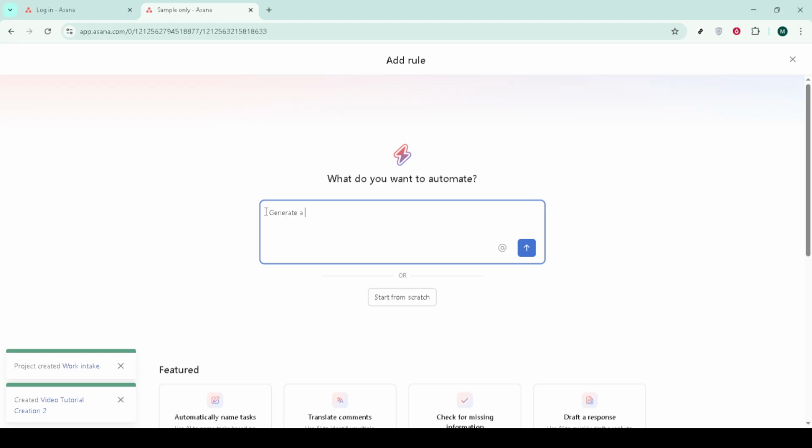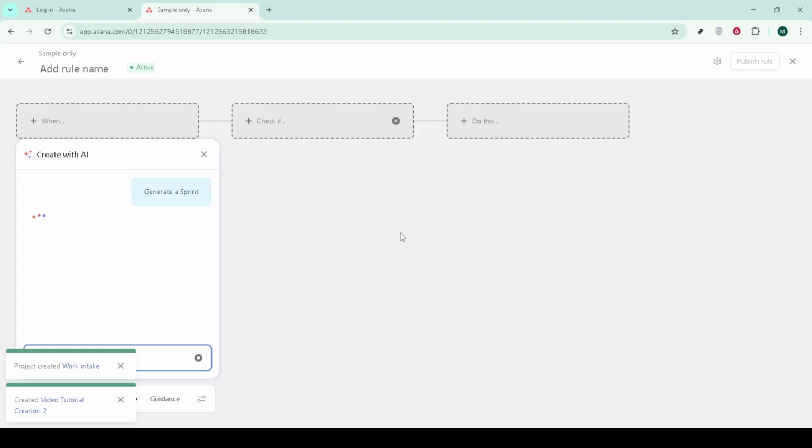At the end of the sprint, use the completed sprint board to walk stakeholders through what shipped. Open relevant tasks, link deliverables, and show the done column to make outcomes tangible. In your retrospective, analyze what went well and what didn't, using completed tasks for concrete examples. Compare estimates to effort, note spillovers, and capture actions to improve refinement, planning, or collaboration.